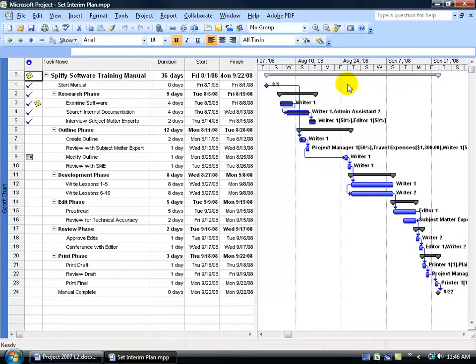as opposed to having all these interim plans, or milestones as it were, in the timeline to compare against. Maybe it was between interim plan 3 and 4 that we were delayed by 2 weeks, at this point in time here. So it's really good at helping me dissect, at the different points in time, any delays, or better yet, any advances or any tasks that were finished earlier that helped get our project to finish early as well.